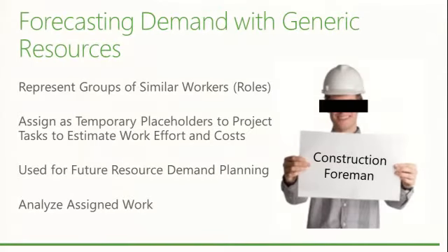All right, so the way that I'm going to show you how to do this is using a combination of a couple different types of work resources, generic resources and non-generic resources. A generic resource basically represents a type of person, we'll say, a carpenter, an electrician, a database analyst, a .NET developer.